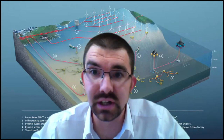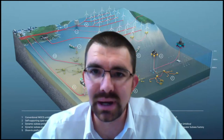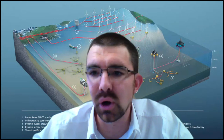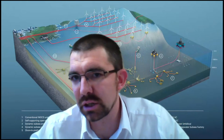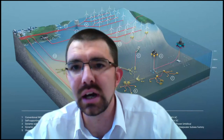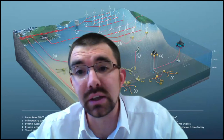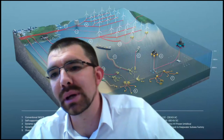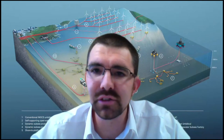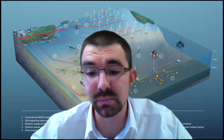The resonant tester is a good example of what we're doing offshore. There are serious amounts of safety that come into operating that. We've got senior authorized persons on site, who are represented by our clients, and everything goes through them. That communication channel is constantly open. Just getting to a point where we can have a sanction to test and allow that HV test to take place goes through numerous barriers, because unlike the onshore markets, it's not so easy to clear everyone out and make sure there's absolutely no one anywhere near the setup. Instead, we have to make sure that the test can be carried out safely where potentially people are, although barriered, still safe.